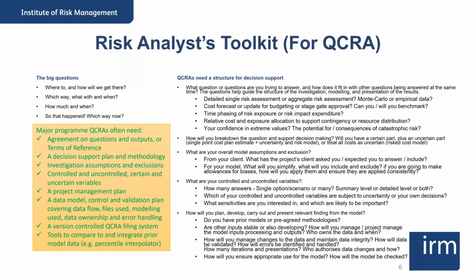on it overall? So in answering those big questions, as concurs with what Matt was saying, we need to understand what the question is. And we need to understand how our model is going to be used in terms of supporting any decision, and what method we are going to use to get there. So a decision support plan: we need to agree the questions that are going to be asked, have some kind of terms of reference, and understand how our model will be used for it. And then as a result of our limitations, we need to understand what we're going to practically assume or exclude.